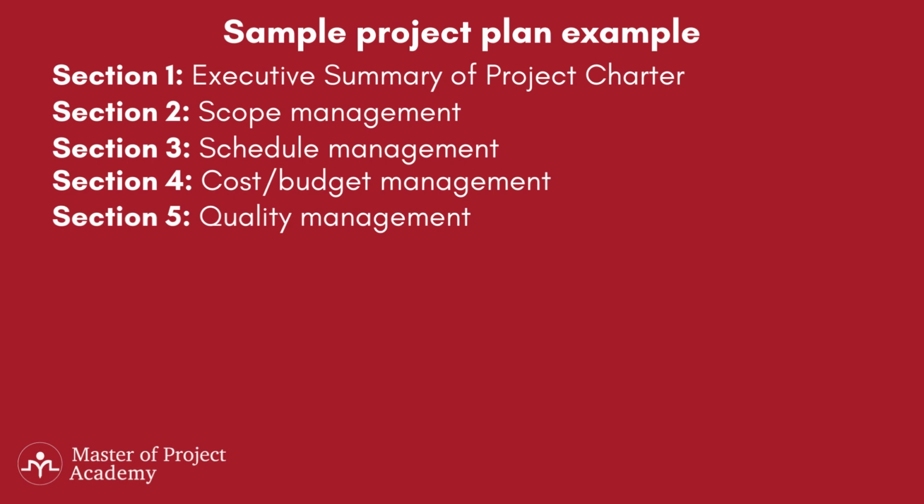Generally, project managers can ensure quality through performing inspections and audits as well as using formal testing. Then, the project management team should document those defects in a tracking system to ensure fixing defects, retesting them, and eventually closing them. In some projects, the project manager may use an artifact like a traceability matrix as a tool for determining whether critical requirements are met or not.